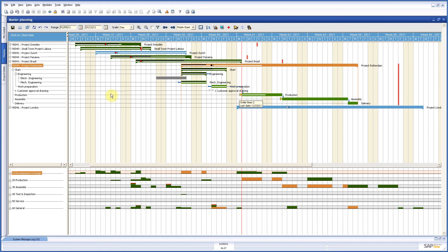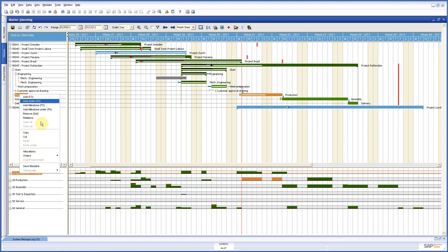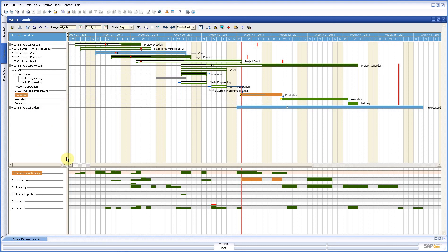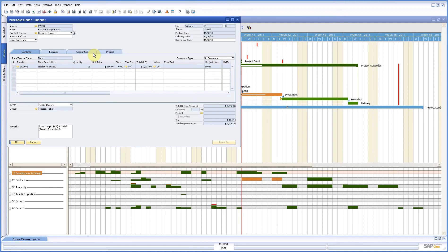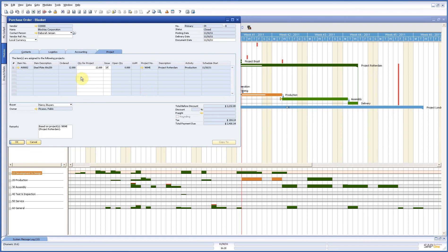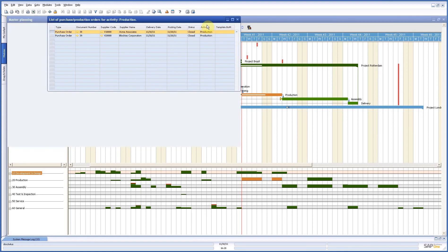Now how can I look into details in this case? I go to production. I right click. I say show me my orders. And here you see the two purchase orders for my project. I can go from there directly into my purchase orders, see exactly what is happening. This one is closed, so it is in. And here we see with the project information, 12 ordered, all 12 for this project and I have no quantity open. So that is the reason you don't see the white triangles.